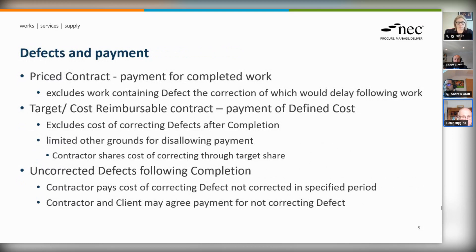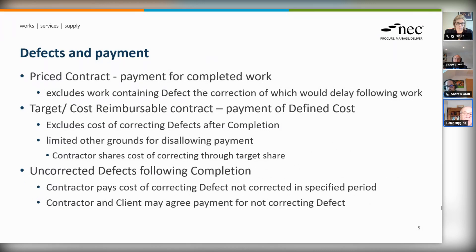Under a price contract, the contractor is paid for completed work. Similarly, completed work is work which is not only finished but doesn't contain any defect which, in order to correct it, would delay following work. If there's a defect in work and you can't get on with the next stage until that correction has been made, then that work has not been completed and it does not get paid for. There's a strong incentive on the contractor to carry out work without defect or, if there is a defect, to correct it very quickly.